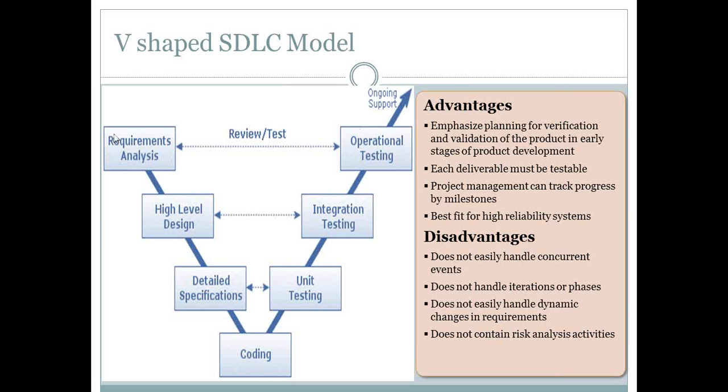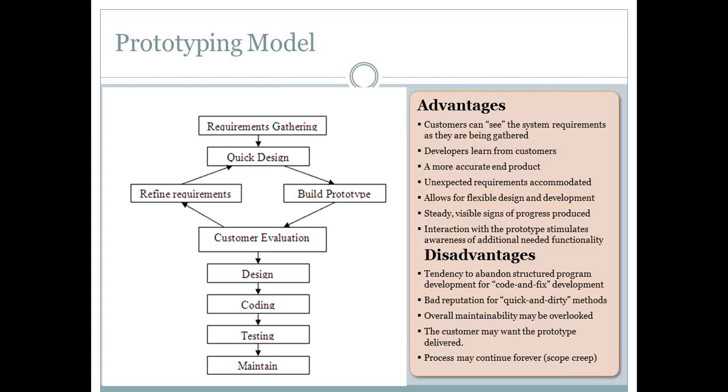So this is a model which I think you need to understand, because the prototyping model is specifically relevant during the requirements phase, right? As the name suggests, a prototype is where you would create a model or a dummy thing which shows how your final product would look like without having that underlying functionality, right? So the way you go about it is that you would create some quick and dirty model of how your system would look like, take it to the customer. The customer would try to understand the system, provide his feedback.